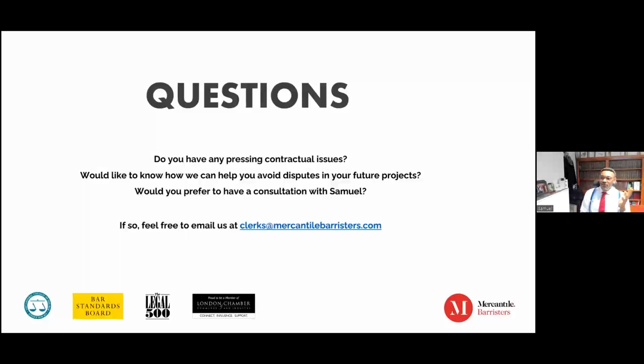Yeah. For I refused to issue it. And it was only a matter of weeks. So, they actually got it done. But all of these issues, once you issue it too early, you're opening yourself up to a whole level of liability. Big time. The defects liability period begins to run. Releasing of retentions kicks in. A whole host of legal implications kick in,